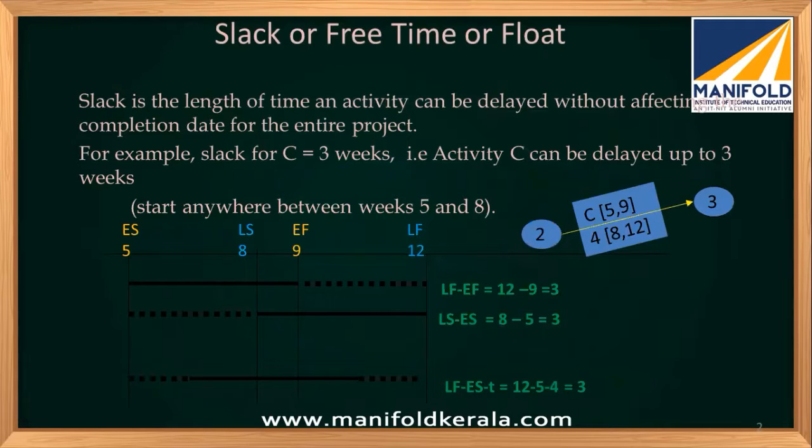Suppose I want to complete an activity. My deadline is today 5 p.m., and I can start my activity from 9 a.m. onwards. The activity takes at least 5 hours to complete. In that case, if I start by 9 o'clock, I can finish my activity by 2 o'clock. So for the rest, 3 hours, I will be free.